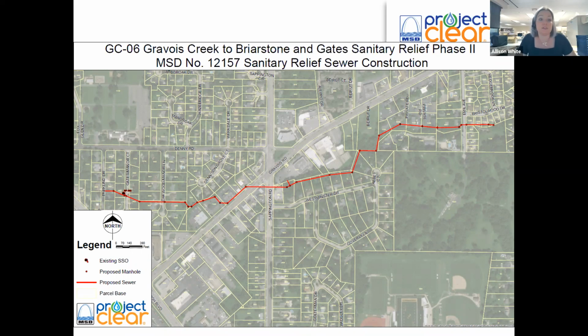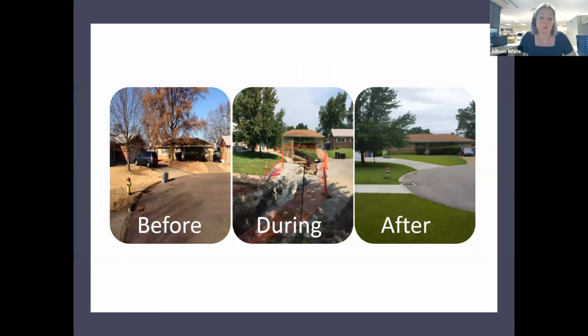Emergency vehicles will have access to all properties along a roadway, and it's up to the construction contractor to determine the necessary means and methods for construction to verify that emergency vehicles can still access all properties. Some examples of techniques that could be utilized would be putting in a temporary roadway or adding plates so that the emergency vehicles can still access all properties.